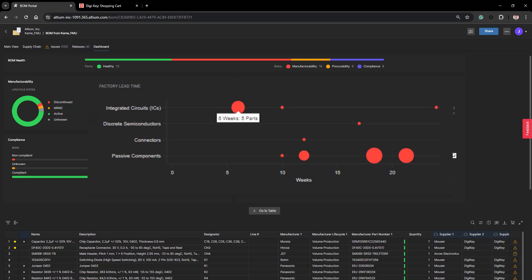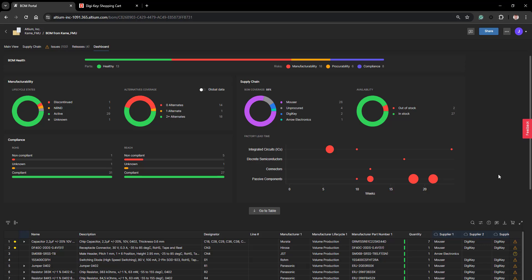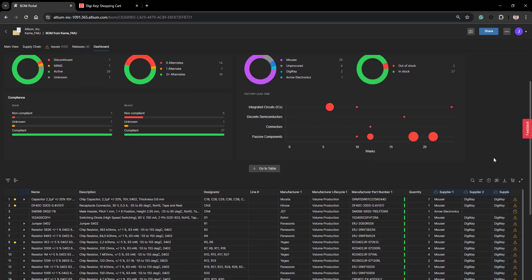As you can see, we have one component that is 24 weeks out. This is a unique chart because it identifies those components that could actually cause problems for your design — it could take only one component to destroy the timeline on your project. By taking this information and working through the problems inside your BOM, it is now time to consider actually purchasing the components.